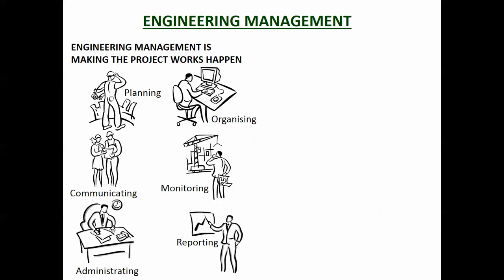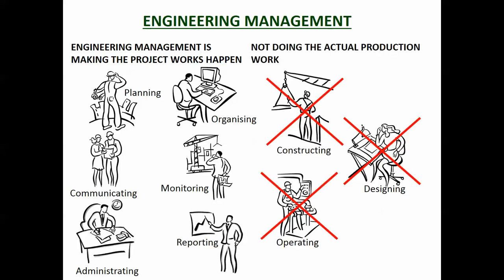And also reporting on the status of the project. So usually every month you have to report to your boss or to your client or both about, is it on time, is it on budget, when do we anticipate finishing it, what are the problems we're having, what are we doing about those problems. So all of that reporting has to happen quite regularly for the people who aren't intimately involved but still need to maintain an understanding of what's going on.